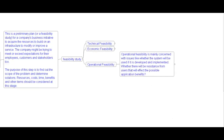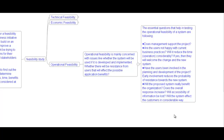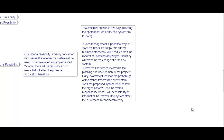Operational feasibility is mainly concerned with issues like whether the system will be used if it is developed and implemented, and whether there will be resistance from users that will affect possible application benefits. Essential questions that help test operational feasibility include: Does management support the project? Are users unhappy with current business practices? Will it reduce operational time considerably? Have users been involved in planning and development early on — as early involvement reduces the probability of resistance? Will the proposed system really benefit the organization? Will accessibility of information be lost? Will the system affect customers in a considerable way?